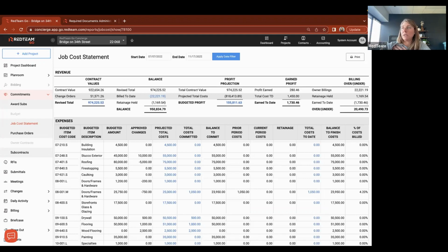It gets really tricky if the owner decides to pay us in multiple checks because with the QuickBooks integration for QuickBooks Desktop, which if I remember correctly is the one that you have, it's going to only allow for one recording for that bill, I believe. So that one, I would say that our best practice would be probably to void and revise the one owner bill and split it into two, so that each bill matches the check payment that you received from your owner, if that makes sense.